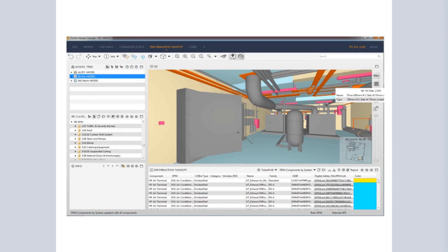In a construction project, if the drawings are produced from 3D models, and in most cases on large-scale buildings these days that's what's happening, then we can take that information from the model and it gives us a schedule of equipment and services and finishes that we need to document within the safety file itself. It ensures that all of the information needed for the file is present in the file.